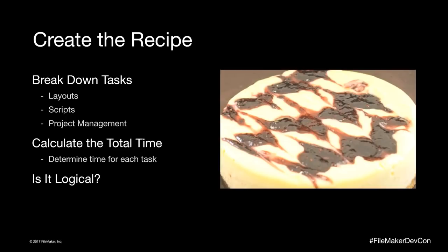And then the biggest thing for me is QA. When I build a script, I do QA at the time, of course. But I don't end it just there. I actually do QA after the fact on the project as a whole. I think what happens a lot of times is people build a project and they test it in the best case scenario, the way the user is supposed to use it, but they don't test it in ways the user isn't supposed to use it. What happens when they click that little red X on the dialog window?